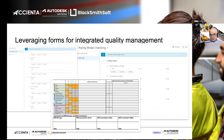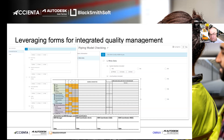When it comes to quality management, we're used to quality in construction itself — quality control forms and checklists — but the same approach applies to design. Any model being shared for approval needs to be reviewed based on certain criteria: checking floors, walls, and other elements for compliance. These forms can be built within ACC Build, signed, approved, and tracked through a workflow, giving you a full history of the quality approach.